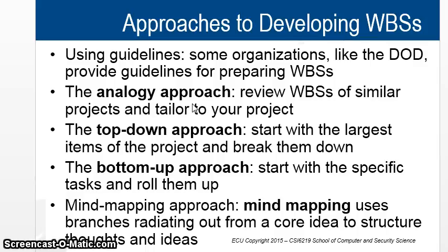The analyst has to review work breakdown structures of similar projects and tailor them to your project. So they look at, for example, for a website, other projects, or how they approached the website, and they just copy the template, configure it, and do it that way. And then there is, for example, how the IT upgrade and transfer system for Japan was done. So we're going to take that and tailor it for our project in Perth. So that was the second one, which is the top-down approach. Start with the largest items and then break them down.